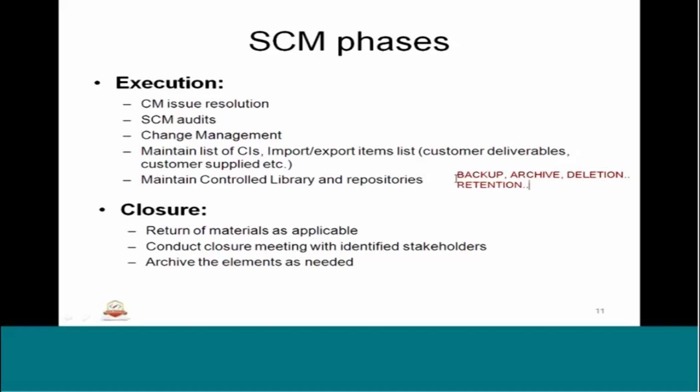Because that may go for a callback, or a rollover, or need to be maintained again, triggered from customer input or internal, or any maintenance or warranty or guarantee, whatever is required. Till that period, retention has to be taken care of. So all this will be part of the execution that is defined in the SCM plan. This is an important SCM phase.